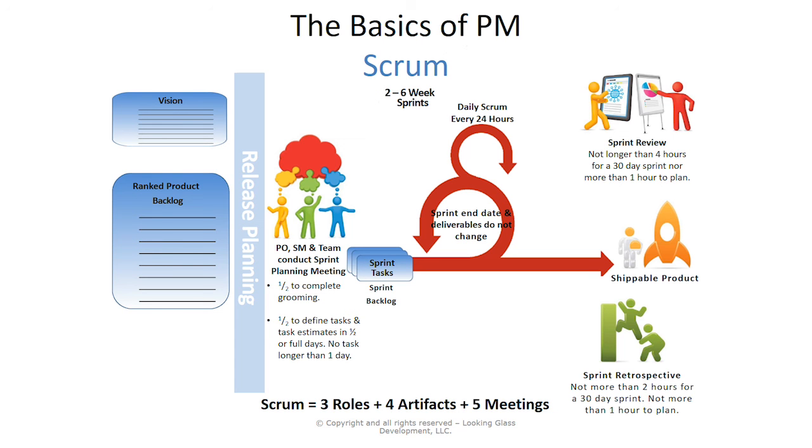Once we get done with the sprint planning meeting, we conduct our sprint. At the end of the sprint, we will conduct a sprint review and a sprint retrospective. Each individual day throughout the sprint, every single morning, we start out the day with the daily Scrum. So that's it at a very high level, but let's go through each one of these and provide you a